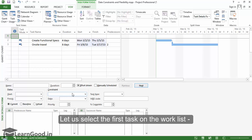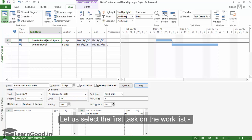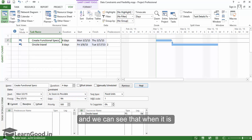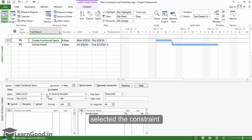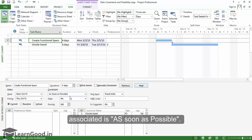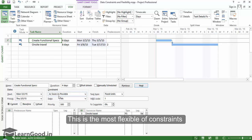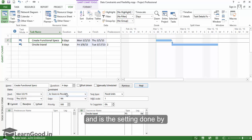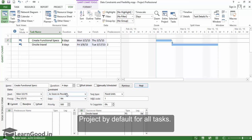Let us select the first task on the worklist. And we can see that when it is selected, the constraint associated is as soon as possible. This is the most flexible of constraints and is the setting done by Project on default for all tasks.